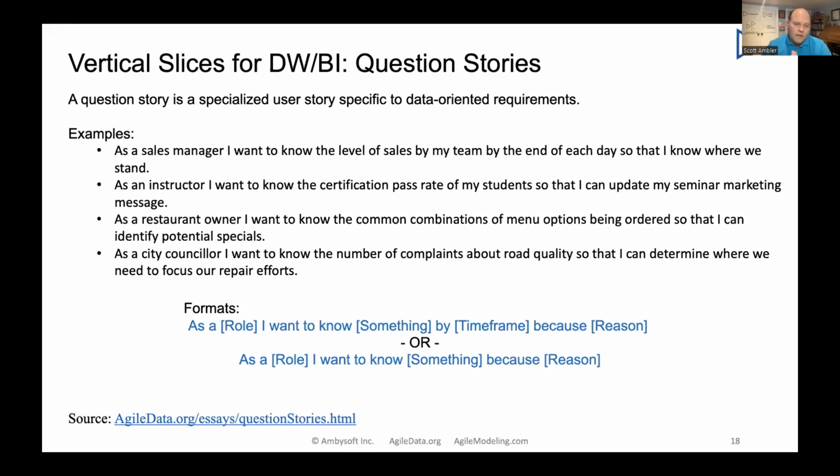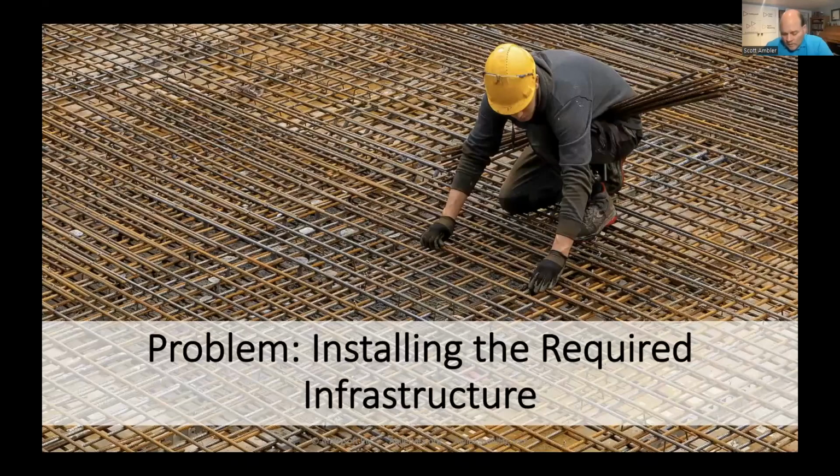So when I go to implement that first user story, that as a sales manager, I want to know the level of sales, blah blah blah, I will do just the work required to implement that story. Now, when I go on to the next story, then I'll be adding on more stuff, and I might have to rework some of the stuff that I've done previously. So the idea here is we want to be adding real value for our stakeholders on a really regular basis, every few weeks or even more often than that. And that's nice, that's cute, as I like to say.